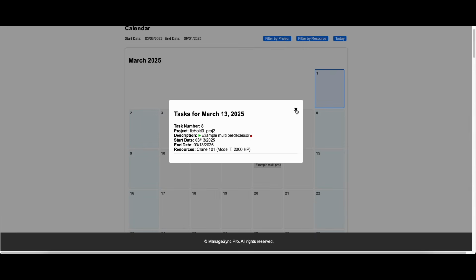Now that becomes useful if you've got limited resources. For example, you have only a certain number of a piece of equipment, and you need to use it on 17 different projects, and each of them are using that equipment at different times. And you need to make sure that that piece of equipment is not being overutilized or scheduled 5 times to be used in one day, whenever it can only be used once in one day, those types of things.